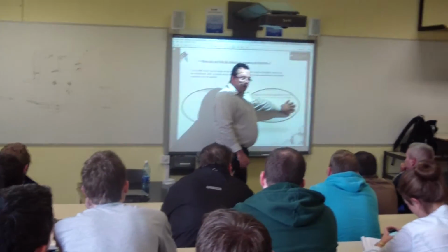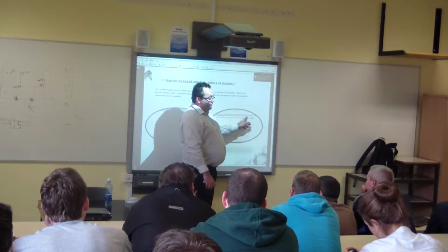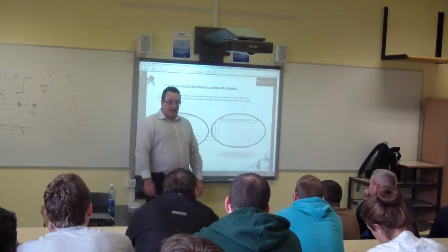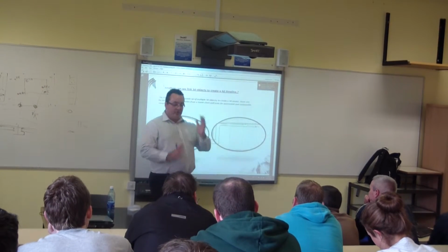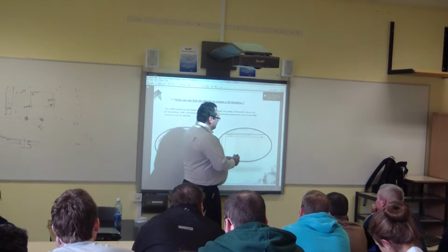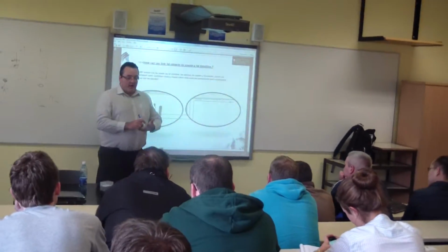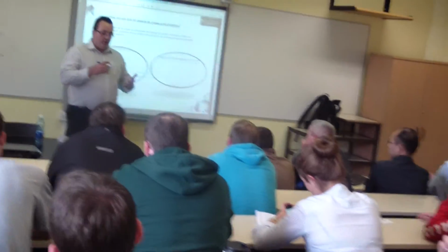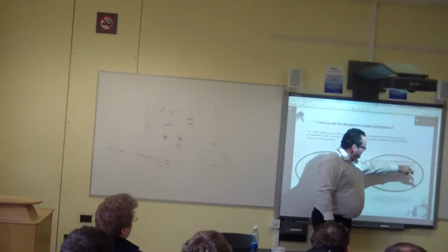This is a Gantt chart in Microsoft Project. There's always a longest series of activities, called a critical path. The critical path always moves and changes depending on how many activities you've got in the program. All you have to do is go into Microsoft Project, go to Tools, Tracking, and put in Create Baseline. What it does automatically is put in a baseline and plan dates.